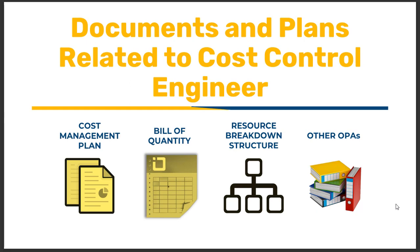Another document the cost-control engineer interacts with is the resource breakdown structure (RBS), which shows what types of resources are needed and in what quantities. Lastly, there may be other organizational process assets such as templates, systems, or cost-estimating methods used by the cost-control engineer.